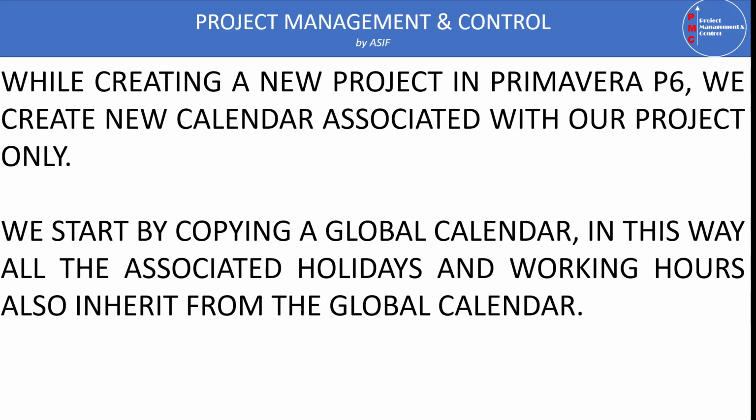Sometimes we copy the project calendar from another project calendar, or sometimes from the global calendar. So it is always recommended, when we are making a new project calendar, to copy it from the global calendar, because the global calendar can be considered as a source calendar which contains all the general requirements or general timetable for the country. It contains all the recurring holidays and working and non-working hours.